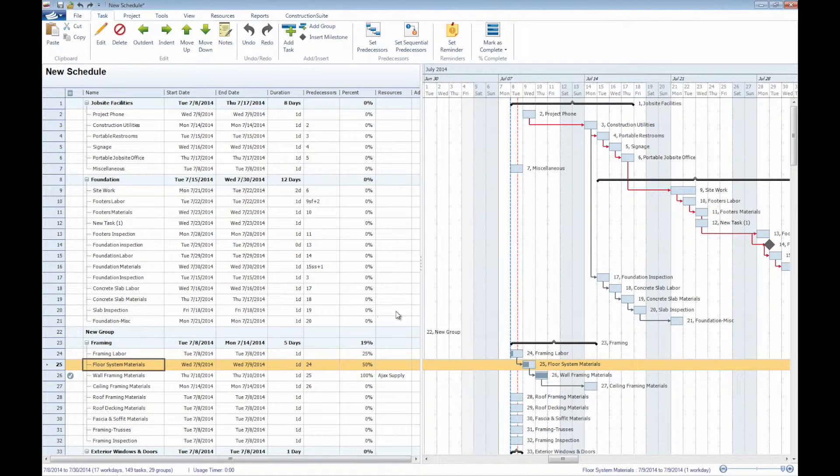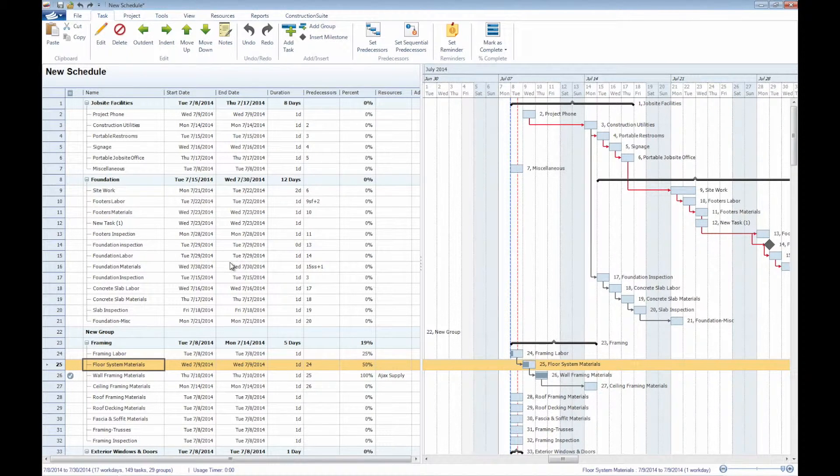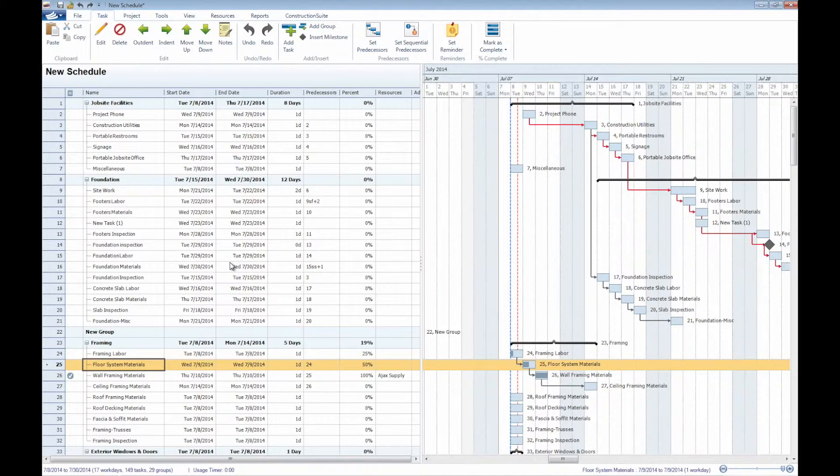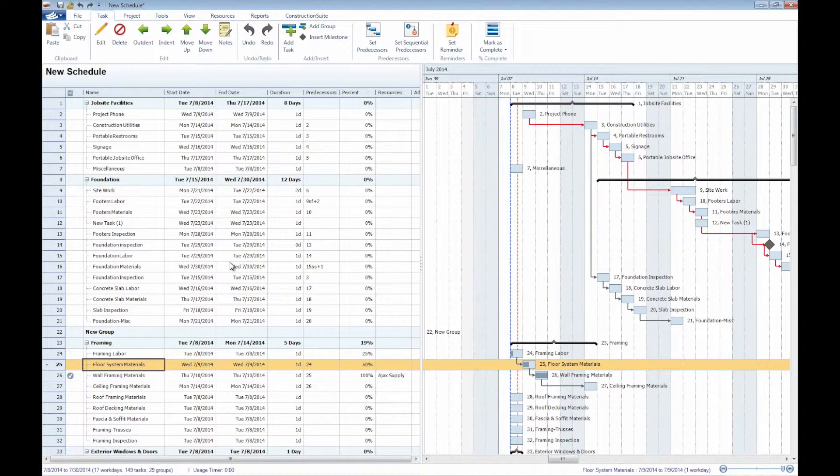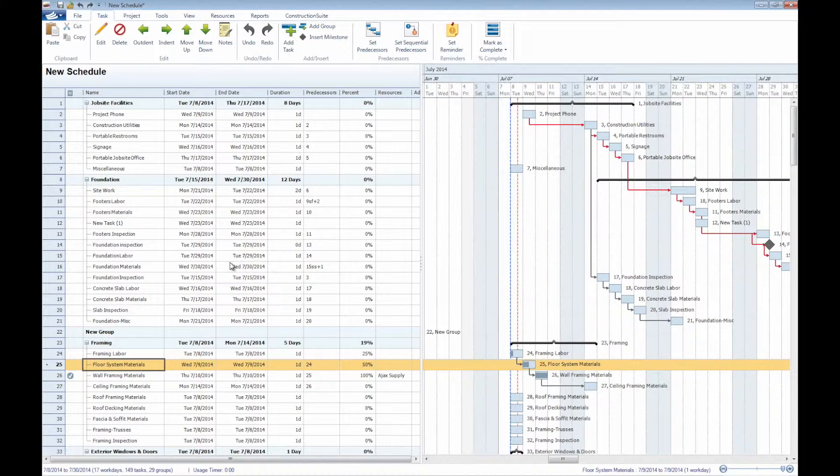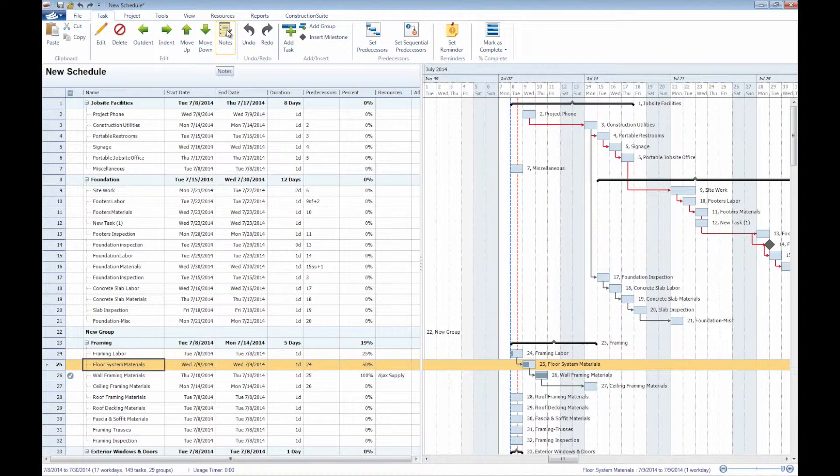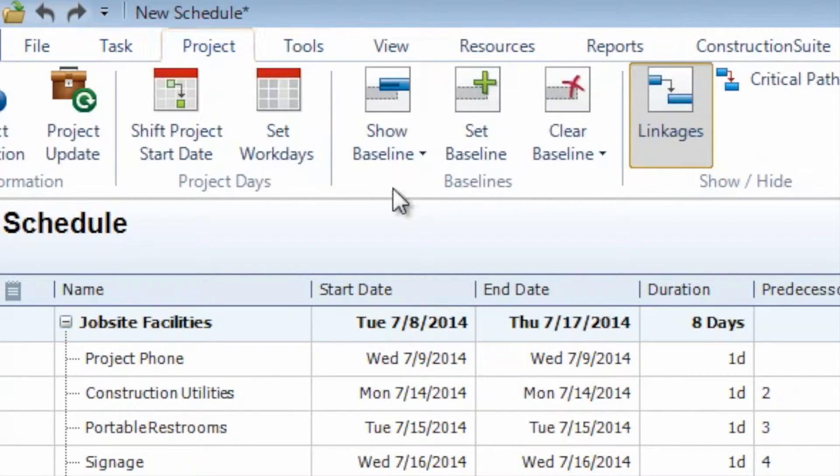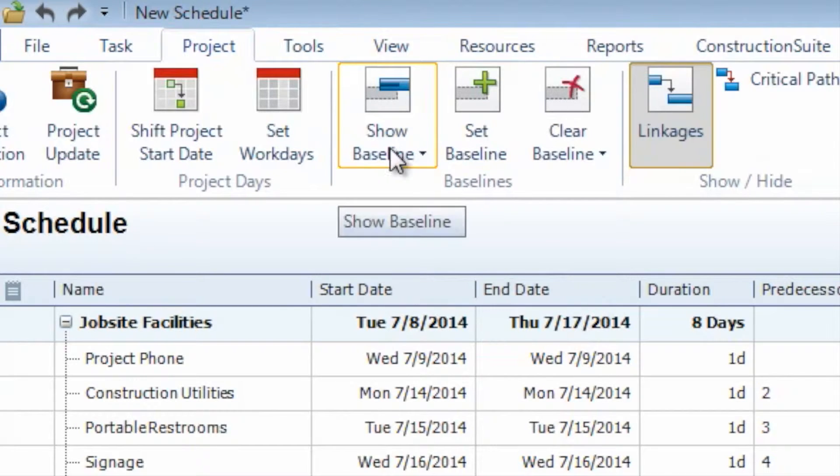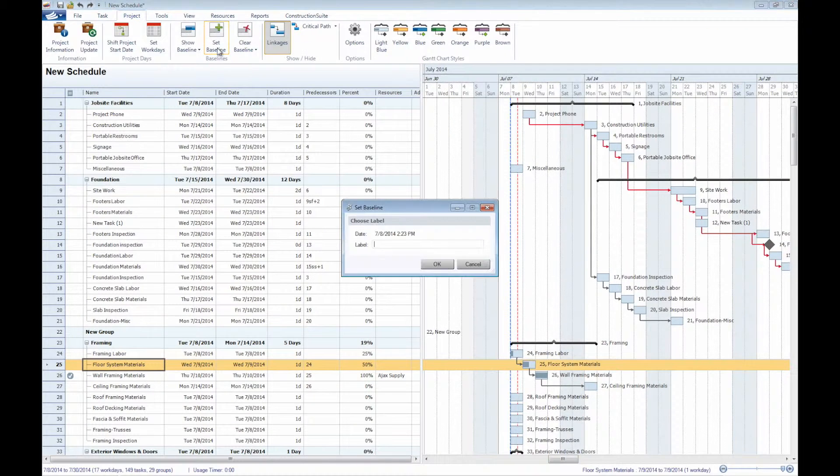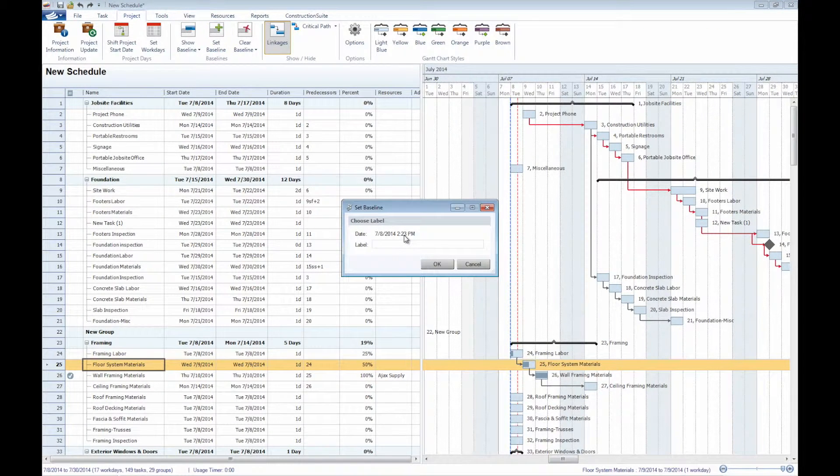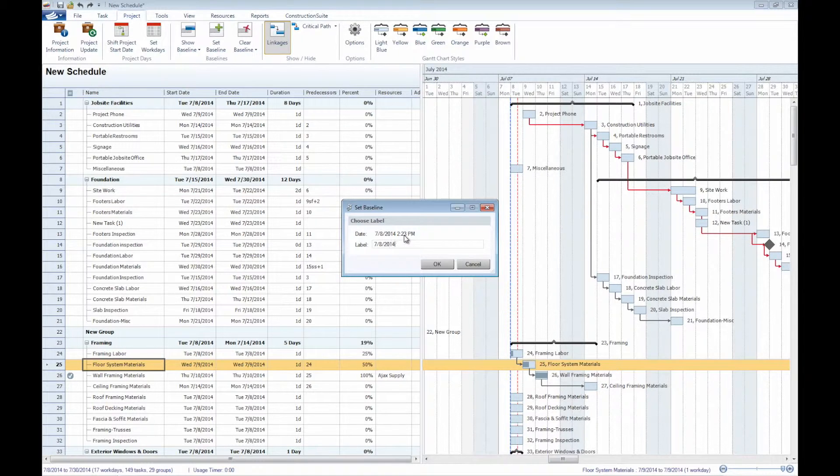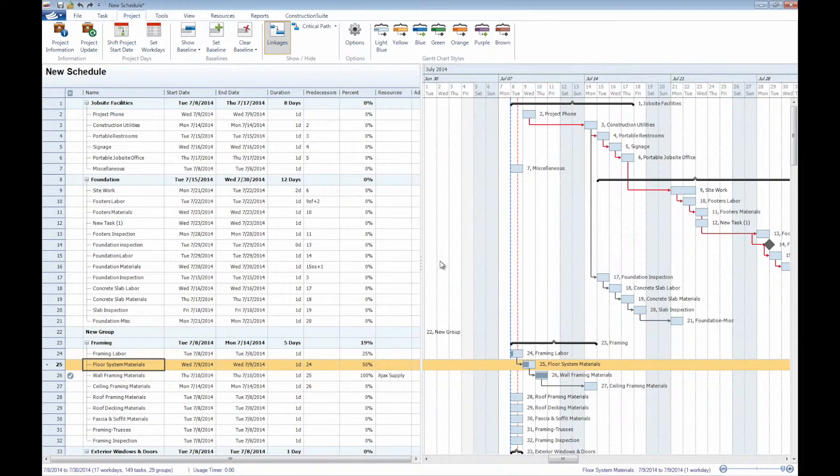In addition to just a very easy, simple-to-use edit task window, being able to modify these individual tasks, adding new tasks, adding new groups, we also have ways of tracking baselines, for instance. If we were to go to the project here, we could go ahead and set a new baseline. Maybe we just wanted to call this July 8th of 2014. Establish this baseline.